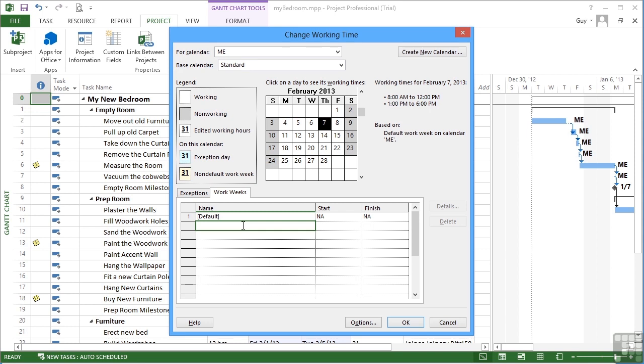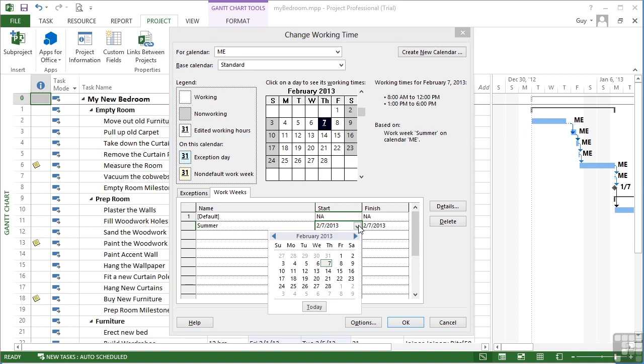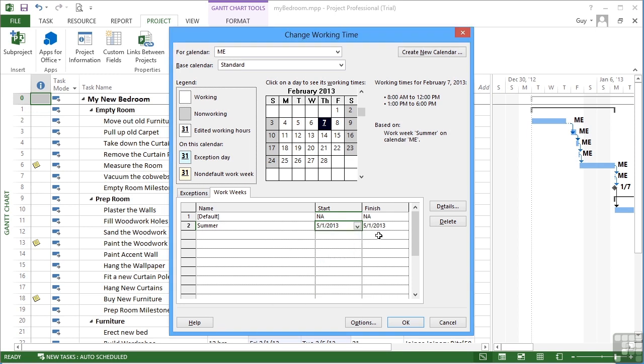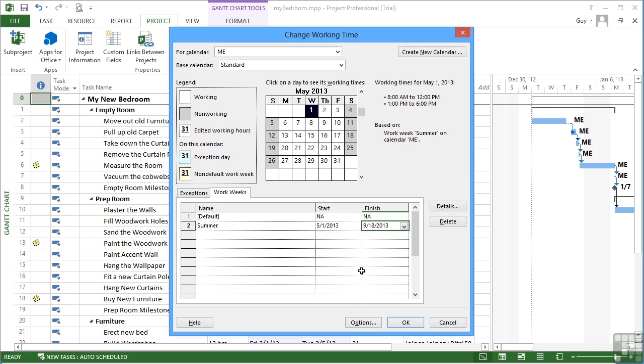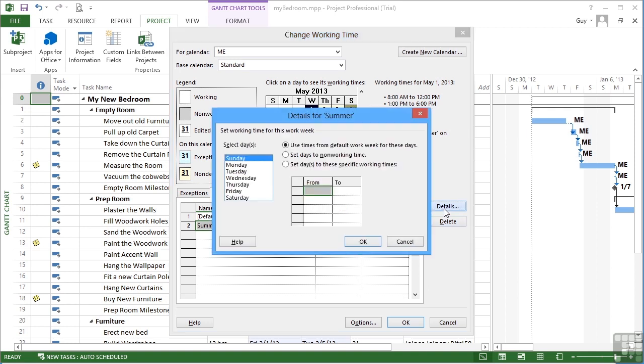Give the new working pattern a name. Let's call it summer. And then I set a start and a finish date for this particular working pattern. So let's assume our summer begins in May time and ends in September, mid-September. So this is now a different set of work weeks, which I can change the details for.